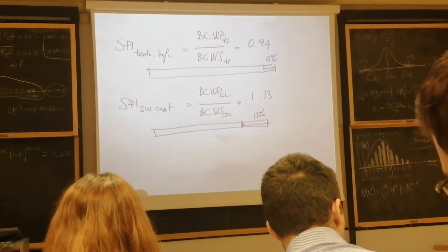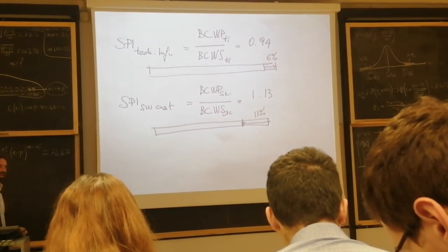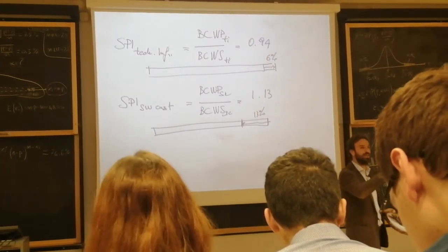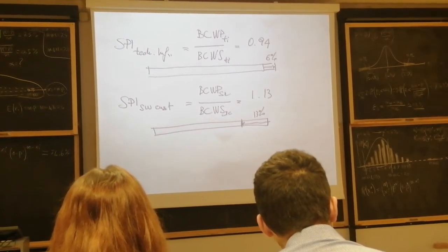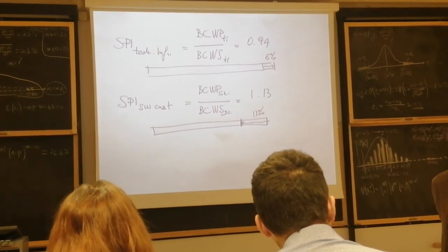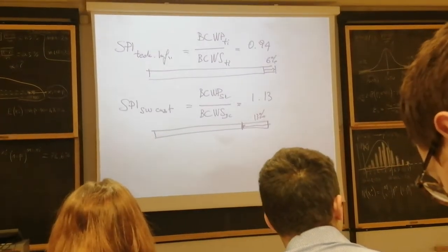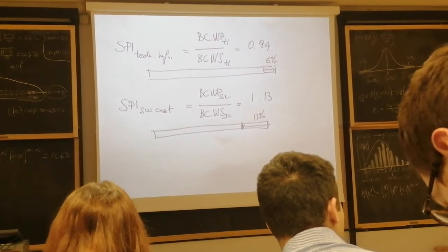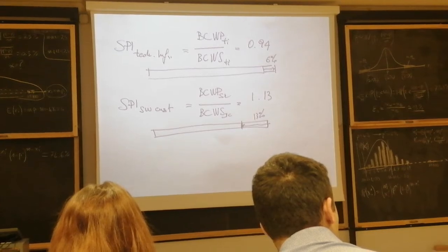So far, so good. So the project is experiencing 6% of a delay, which in time value means 6% of what? May, June, July, August, September. 6% of 5 months. How much is that in days? Work days or calendar days? Elapsed or work? Calendar. So E days.